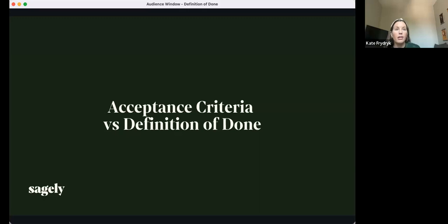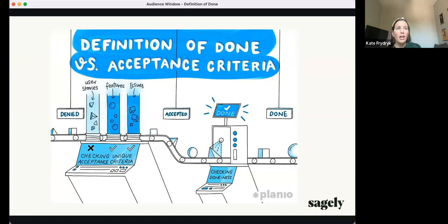Thank you, Dane. Kind of going off what Dane said, if we think about our work items, our user stories, features and issues, everything there is unique to the piece of value that we're adding for the user. As Dane said, it's the code we're writing, the work we're doing. That's all unique, and each individual work item will be checked against its own criteria that the product manager has decided. The definition of done is applicable to every single user story.